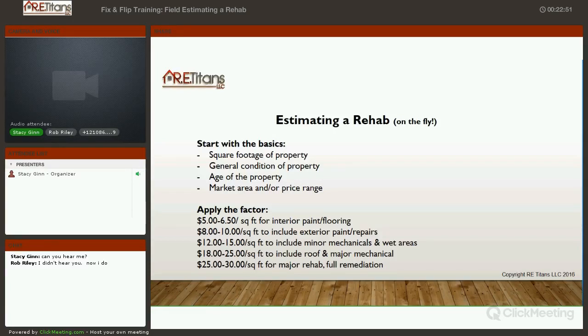If the plumbing's all there and it's not PEX or PVC, and all your walls are exposed, you're not going to get away with just fixing what's exposed because that inspector can see that and they're not going to approve that. There are situations where you get in and you're only doing a certain area, and that's what you're permitting for. So therefore, they're not looking at the rest of the house. As long as that's functional mechanical, then you might not incur that cost. But when you're looking at a full remediation, you're looking at a lot of cost.